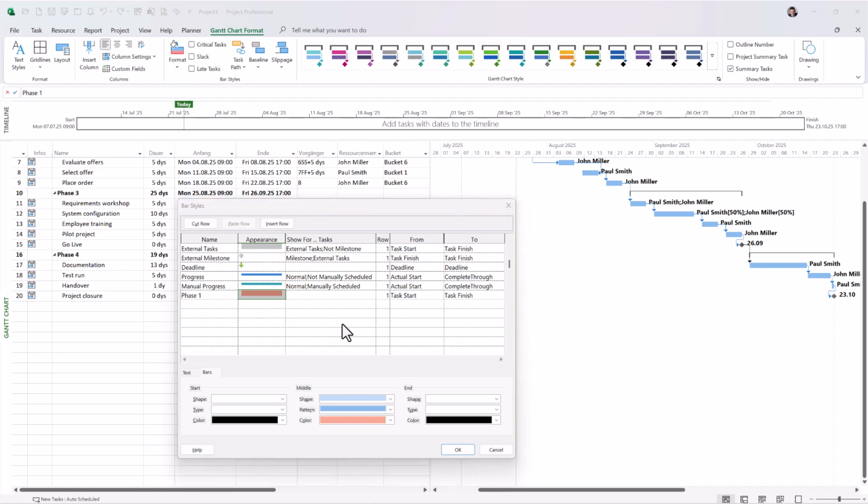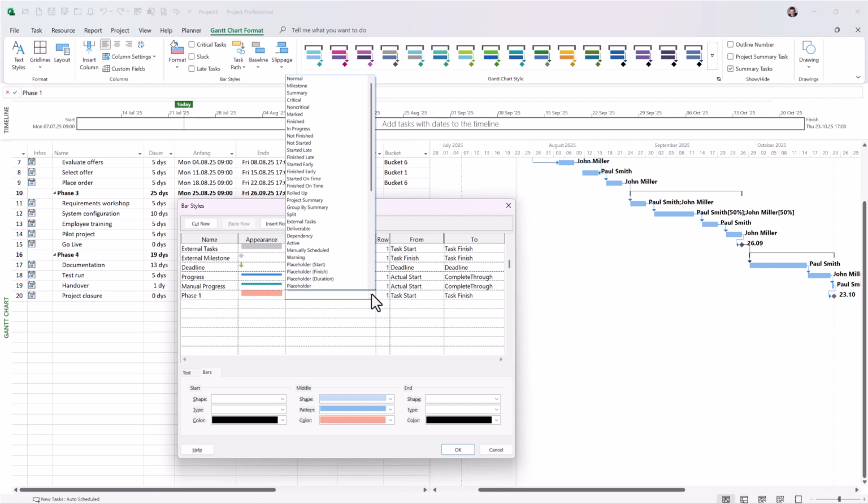And what's a bit special is the way you define the condition. All these fields that you can select here are yes/no fields. And so you can click together certain conditions that must be true for this formatting to be applied. In our case, we need custom flag fields or yes/no fields, and they are called flag 1 to flag 20. Since certain flag fields are already occupied in my environment, for example 1 to 5 are occupied, I use the field flag 6. In your case, you would choose flag 1.